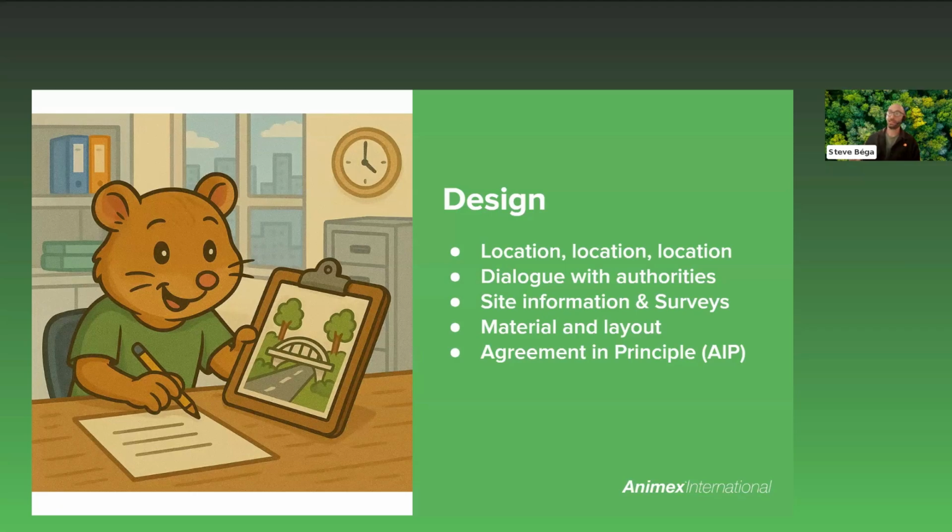We've seen some projects completed in 3 to 6 months from the identification all the way through to the installation, while others have taken multiple years and multiple phases within a construction period. The design delays aren't always caused by the arboreal bridges themselves. Often when a bridge is considered as part of a larger project, things like road or utility layouts as part of that project may be adjusted, and therefore what was originally designed for the bridge and where it was going to be also needs to be adjusted and tweaked. So just obviously bear that in mind.